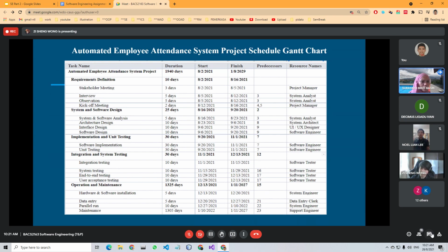During the stakeholder meeting, you said that it is to familiarize with all of the stakeholders, right? Yes, including the client and the developer. It is like a kickoff meeting also. For our project, the kickoff meeting mainly discusses with all the stakeholders the constraints, milestones, and deliverables for the project start.